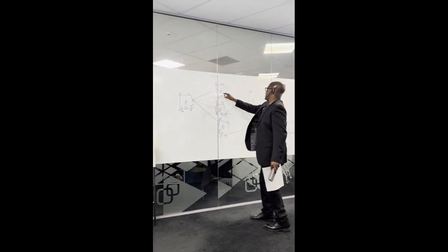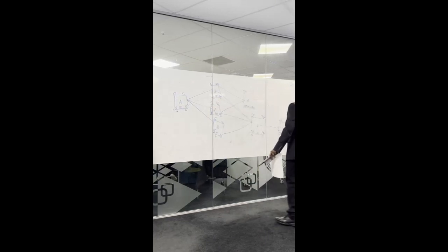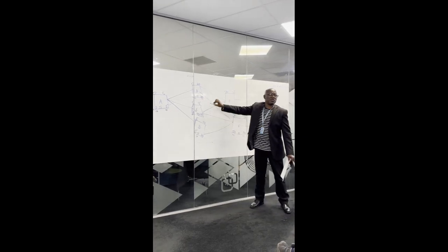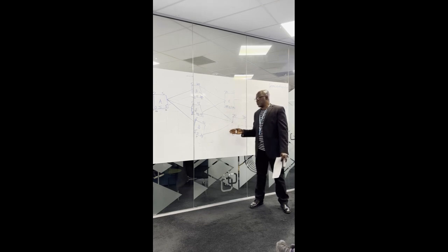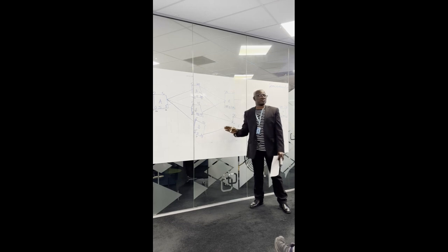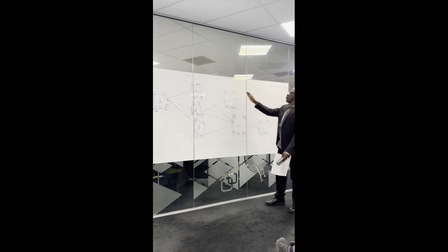Because this part started here and here. But this has to take a call from here like that. You see the problem now? Because we have a lot of multiple connections. So that's where you have to reason. Think that when you are coming back, among all the paths that get connected, you have to pick the lowest. But you have to sort it out. Then here, when you are moving forward, you pick the highest.